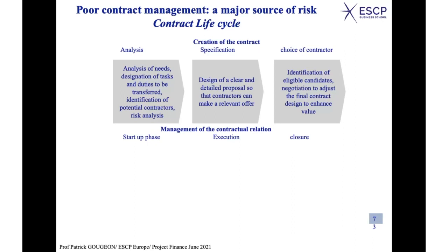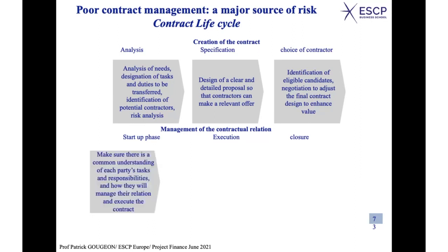What comes next? Startup phase. Why a startup phase? Because those who have made the decision, who have been involved in the creation of the contract, on both the client and the supplier side, are usually not those who are going to manage the contractual relation. On the supplier side, usually you have the commercial team.